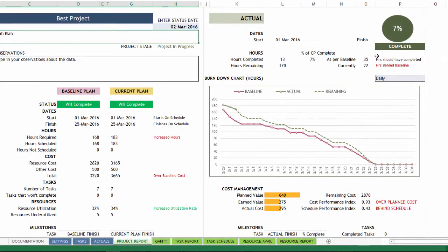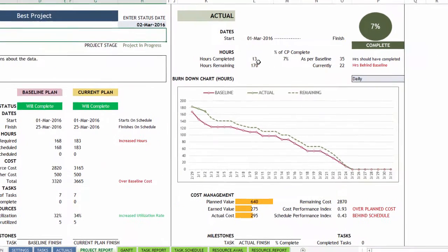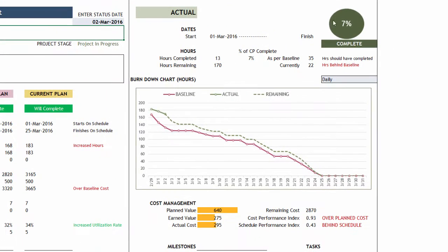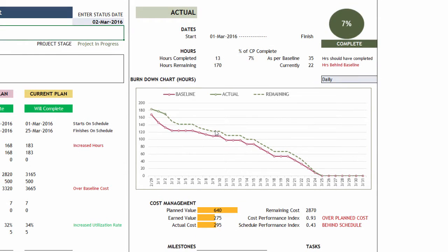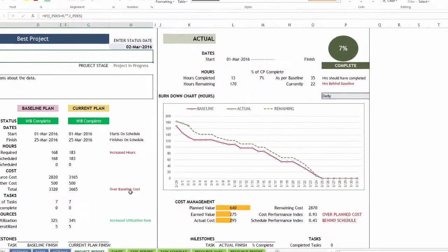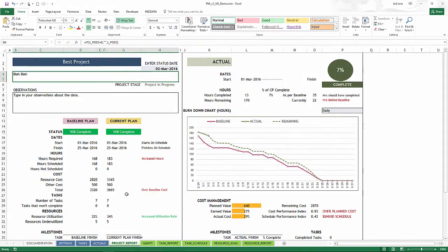You will also have data on actual progress that has been made, what percentage of the project is complete. You have a burndown chart for the number of hours. And you have a cost management information around cost performance index, earned value, planned value and such. You have resource utilization rate. So all the details are here at the project level.